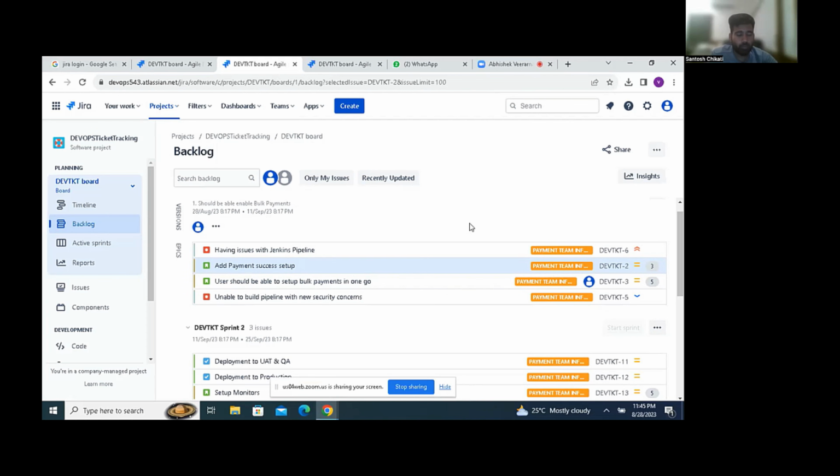A few sized it as 3, a few sized it as 5. Then we had a good discussion, and we took the average of 5 plus 3, 8, divided by 2, and we came to 4. We can't take 4, right? We put it as 3, and then the developer started working. Later, the developer realized it's a 5 pointer, because they thought it was straightforward work.